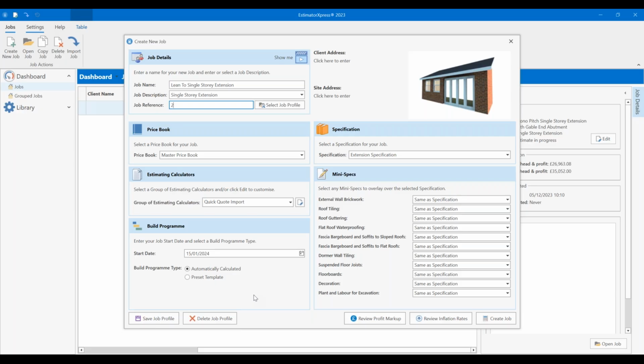You are always welcome to extend the phases. I fully recommend you do, to account for, say, other aspects in life that you may be aware of that the software is unaware of. But it does mean you know your ideal circumstances, kind of min build speed. So a project cannot be done in 3 weeks when the software is saying it's going to take 5, effectively.